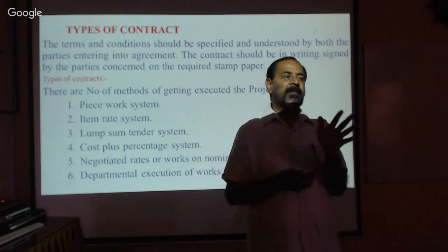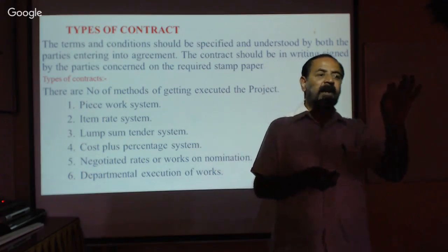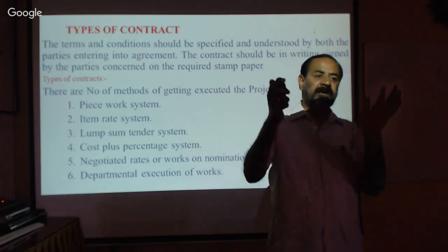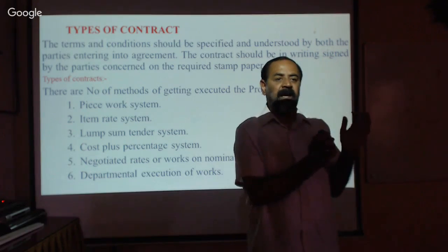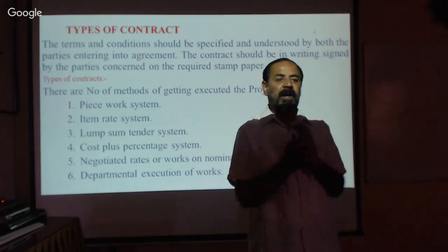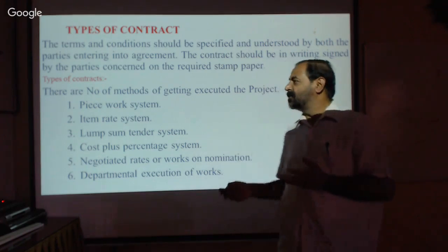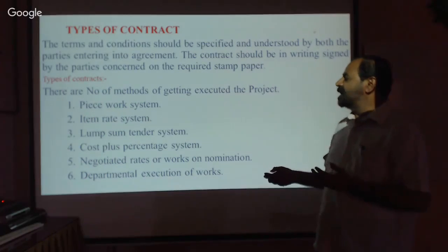Every engineer in the department, in the government, must follow that, isn't that? Accordingly, they must calculate the quantity of the work and the cost of the project will be calculated. Now, therefore, when you have the quantity of the material, now for each quantity, there will be a specific rate, isn't that? Now, the work contract will be awarded according to the rate.